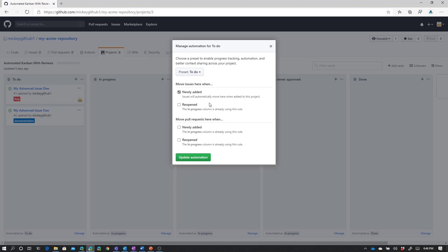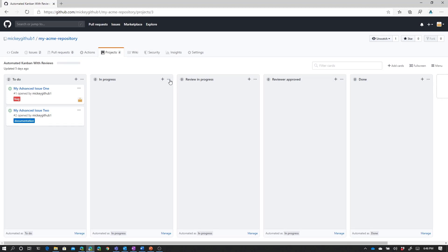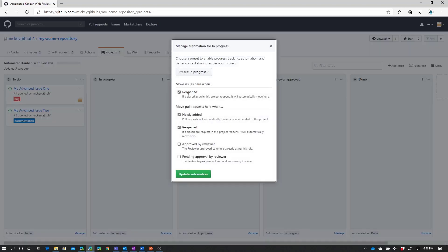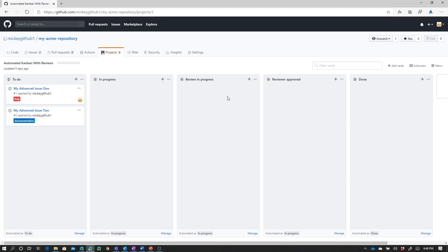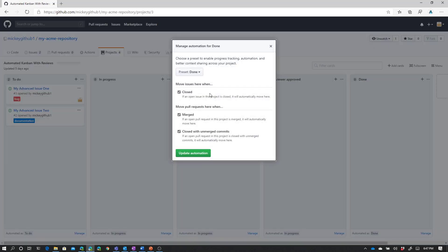Now, for issues, which is what we're concerned with in this video, the other automation we have under here is reopened. But you'll notice that the reopened is being used in the in-progress column. Which means that if we had an issue that was closed and then we reopened that issue, it would automatically show up in this column as well. Now, the review in progress and the reviewer approved columns are both used for pull requests, which we're going to look at in a future video. And then the automation for the done column for issues or any closed issues will automatically move to the done column.